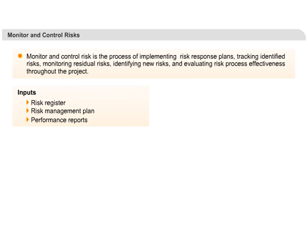Risk management effectiveness can be analyzed in light of the project's progress. The techniques used for monitoring and control of risk include risk audits — checking whether the project is really identifying risks and working on a plan to resolve them — as well as continuous risk reassessment, which is a periodic review of the risk management plans.